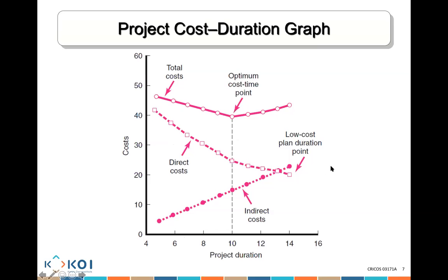So you see here, when you combine them together, you know that this one here is the actual lowest possible cost. I can finish it in, whatever, 13 days, and then it's going to cost me 23. This is the actual cheapest possible cost when I combine both the direct and indirect costs together. Actually, sorry, this one here, that's the actual cheapest one.